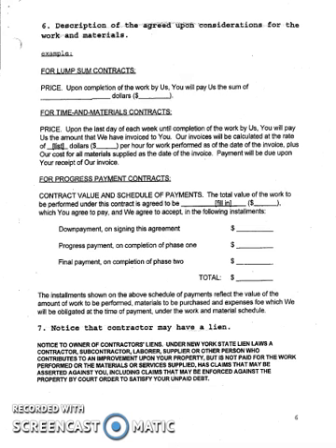And then you also have a progress payment. So the progress payment may be in the form they've shown here as a down payment upon signing the agreement, and then the completion of phase 1, and then the final payment at completion of phase 2. Progress payments could also be monthly. They could be weekly. They could really be on any type of terms that you agree to with the owner.